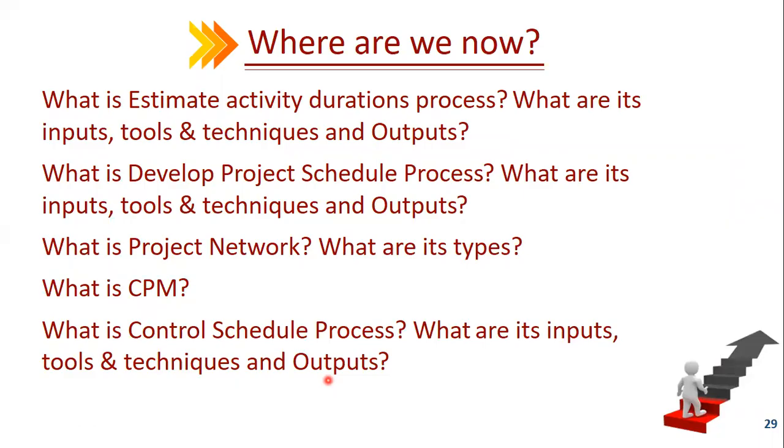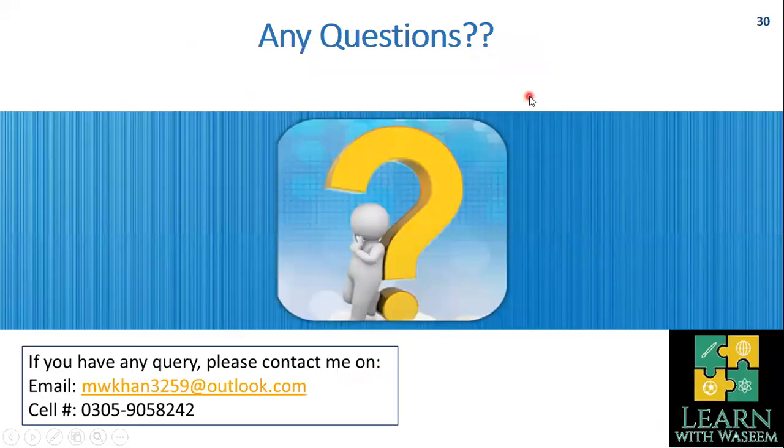Before leaving this lecture, I would like to tell you that I think it is much better and much easier for a student to consider the project and start it with zero, not with one. If you start a project with zero, then it becomes very easy for you to identify the earliest start and earliest finish and the latest start and latest finish dates. So I'll recommend that particular type of project for you. So that's the end of the chapter.